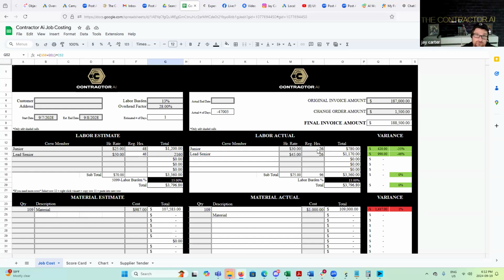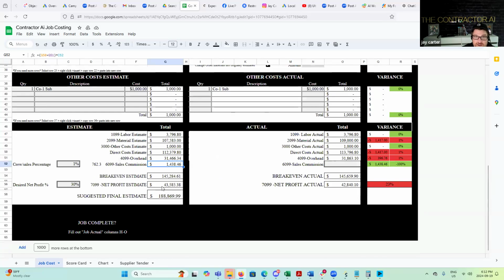But I've also done something smarter than that. If they're over on another job, they're not getting rewarded for that. It's the whole accumulation of that quarter. So remember my rule, you don't lose money. The thing about it is, if you learn to price properly, you'll realize as a contractor your only job is not to lose money. You've already made profit. You made profit when you sold the job. If your profit was 30%, then you're fighting tooth and nail to collect your 43 grand. And anytime you can exceed that, well, that's good.